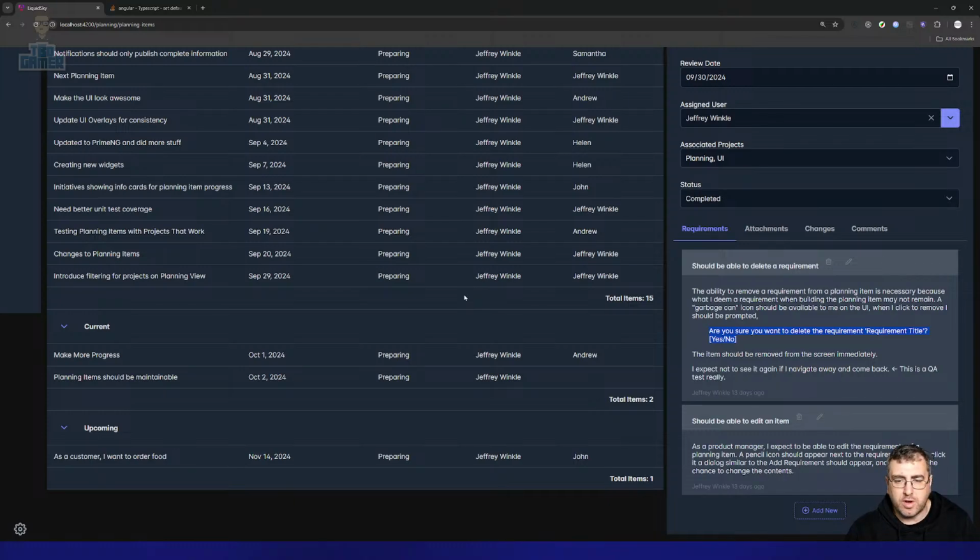So you're saying, okay, we're going to take this planning item. We're going to build out the stories for it. And we go on point and we find out that's 32 points. And we do another planning item and we point that. And then the product team is like, I want this before this. So priority is something that I need to work into here somewhere soon as well. I need to figure out what priority means. But ultimately, the priority comes from the planning item, not the actual stories. But then the team's got to figure out, okay, well, the priority is on this over this. Where can we get these points from? And can we do that? So it's for the team to figure out how they're going to juggle those items in there, right?